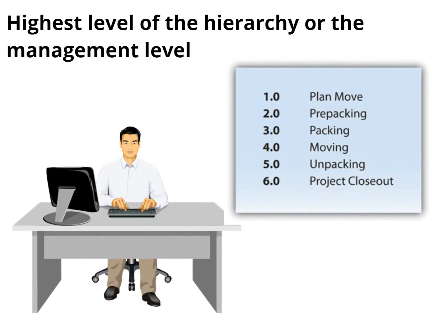Developing a WBS begins by defining and developing lists of all activities, work performed on the project that consumes project resources, including cost and time, needed to accomplish the work of the project. The first draft of the WBS includes activities at the highest level of the hierarchy, or the management level, and typically includes the major activities or summary activities required to accomplish the deliverables identified in the project scope of work. On John's Move project, these top-level activities are numbered 1.0, 2.0, 3.0, and so on, as shown in Figure 8.1.